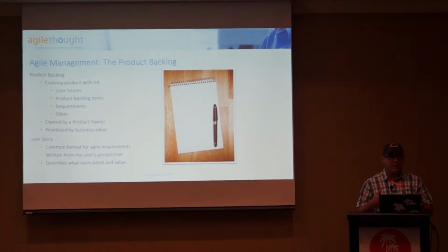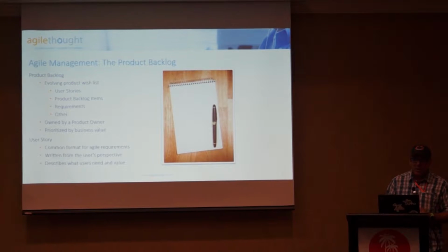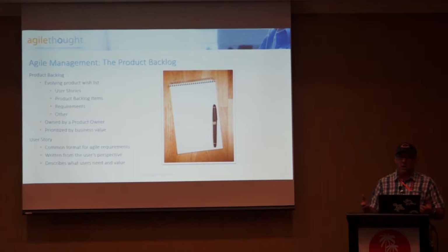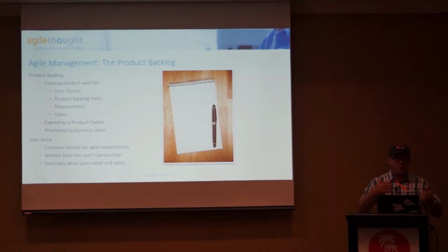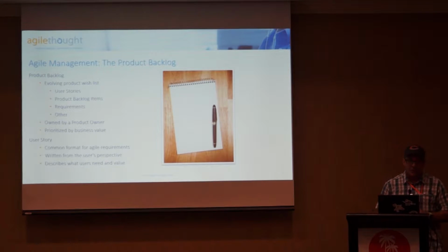And again, this is not something that's specific to TFS, it's more of an industry standard, that product owners own backlogs. People get confused as to, well, who's going to prioritize my work? It's the product backlog owner. They get with the business, and the business tells them what the business value is. They say, okay, based on what you're telling us, this is what we're going to work on, and they prioritize that backlog for you. Now, that's just the product backlog, not to be confused with a sprint backlog, which we'll look at next.